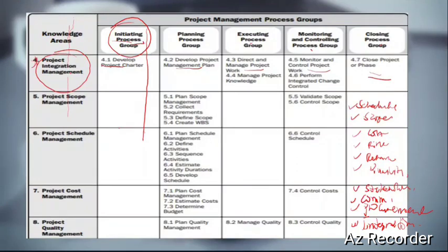But I've seen projects where the project charter was given to the project manager to write. But in real life or in proper practice, that should not be the case, because we assume that there's a sponsor who understands what they want to do. They put together a high level document called the charter and they give it to somebody to handle that endeavor. And that's the project manager. So they sign it and give it to the project manager to give him authority. Now you have the go ahead. This is how much we are giving you. Funds are ready, are available. You could go ahead with the project. So it should come from somebody above them.